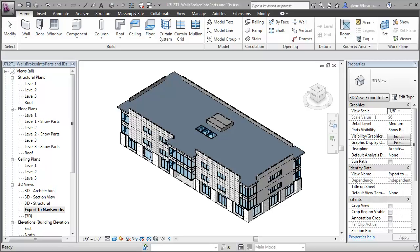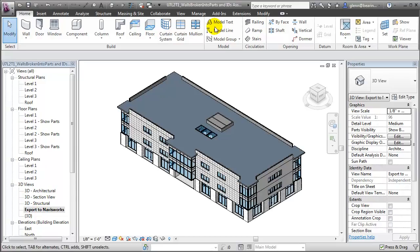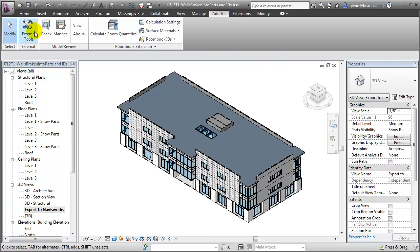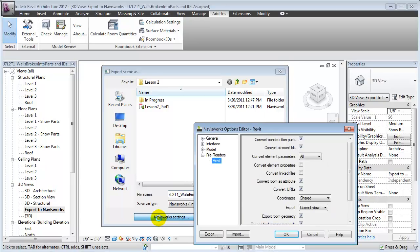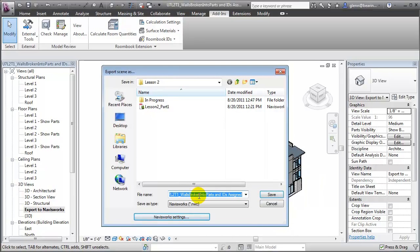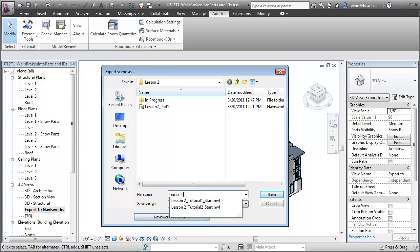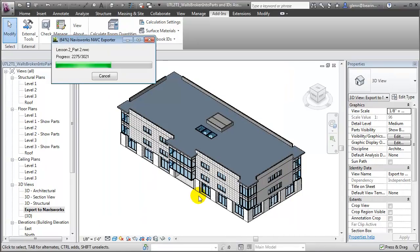With the parts created and the task IDs assigned at each of the floor levels, we're now ready to export our model to Navisworks again. Let's switch to the Export to Navisworks view to be sure we get the 3D model that shows all of the different elements. We can return to the Add-ins tab, choose External Tools, and the Navisworks file exporter. This time I want to check one very specific setting — because we're working with parts, I'll want to check that the Navisworks settings are set up to export that part information. The important thing to check is that the Convert Construction Parts checkbox is enabled. If it is, then the parts information will also be exported to Navisworks for scheduling. Let's say OK, give this a new name to reflect our updates, and wait as the building elements are exported to the NWC file format.